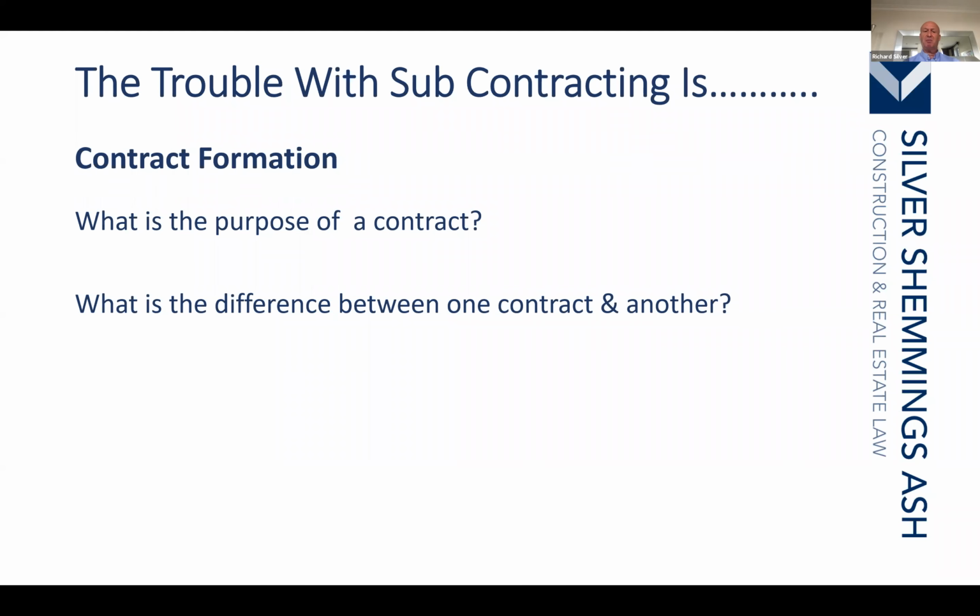Now, when a particular problem arises, ideally you want to be able to open up the form of contract, read it, and see what it says you should do in those circumstances. Where the contract is silent, you will have to look at the common law, in other words case law, to establish what happens. That can be complicated and uncertain.